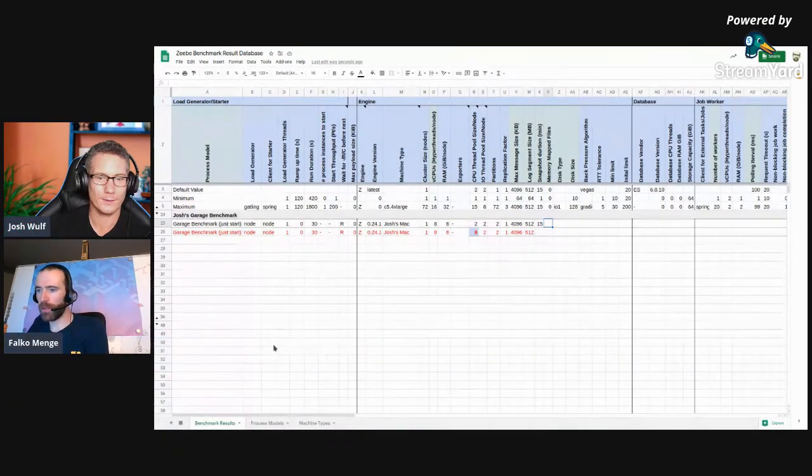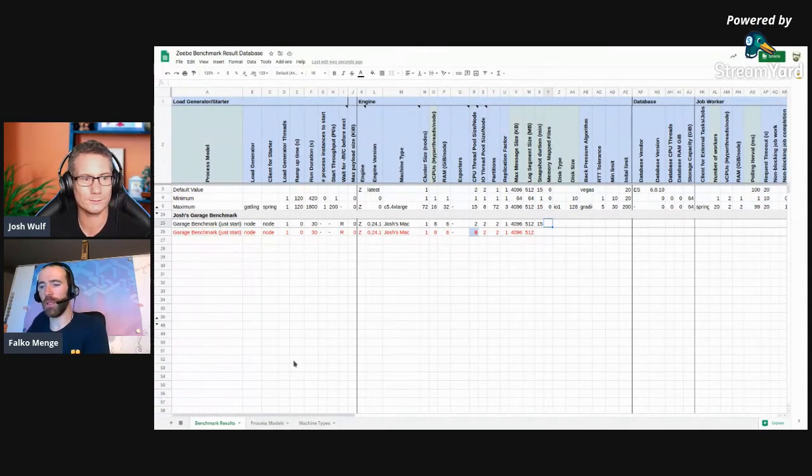Yeah, to answer that question, it's not the main idea of Zeebe to do benchmarking, but if you want to run Zeebe under load and have a hard throughput limit that you need to reach or a cycle time limit, then doing benchmarks is a really important step, and it should be done early in your project, not late. Because if you find out late that you have problems, it might be too late to adjust your application design, or you might end up throwing a lot of hardware at the problem, or maybe even find out that your workload is not what Zeebe can serve at the moment.